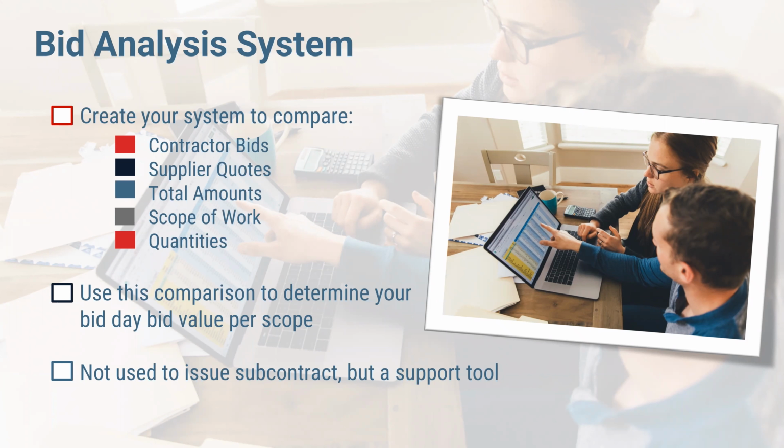At bid day you've got the electrician on the phone who's apparent low, but you don't really know. You double check with him. You call him up and ask, did you get the transformer on the third floor? Did you get those 14 light fixtures that are specialty made in Bangladesh that are stuck in the executive wing? So it gives you a tool to back check against what your subs are doing.